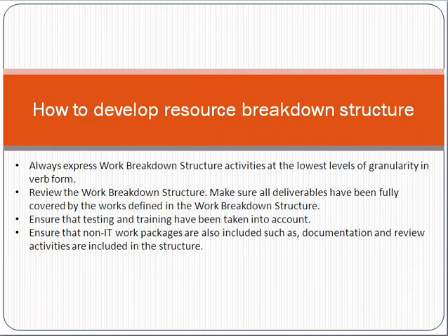Now, how to develop the resource breakdown structure, friends? First of all, always express work breakdown structure activities at the lowest level of granularity. Review the work breakdown structure. Make sure all deliverables have been fully covered by the work defined in the work breakdown structure. Ensure that testing and training have been taken into account. Ensure that non-IT work packages, such as documentation and review activities, are also included in the structure.